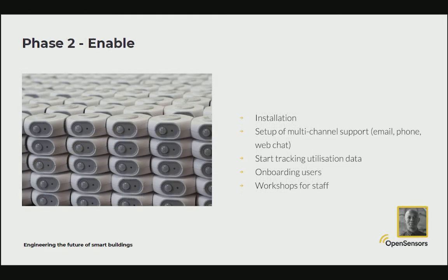So when we come to actually deploying each network within a building, the one added advantage in spending so much time planning out for potential risks and obstacles is that it makes our deploy time much more rapid. Each one of our kits that we ship out to clients is pre-configured and packed, and everything is asset tracked, not only the actual assets being shipped, but on our system we can also match those assets to physical locations on the project as we map them in real time. A great thing that then allows us to do is to unpack and potentially have hundreds of sensors going live in hours, as well as all of that gathering data in real time.